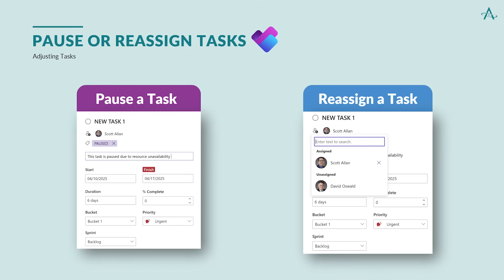Any project manager knows that the only constant in working a project is change. Tasks may need to pause if dependencies are late, resources are unavailable, priorities shift, or any number of issues arise. Planner does not have a pause button, but it does have labels and notes. In task information, select the label and edit it to show pause, then add the note as to why it is paused. It's also a simple matter to reassign the task if the situation calls for it.